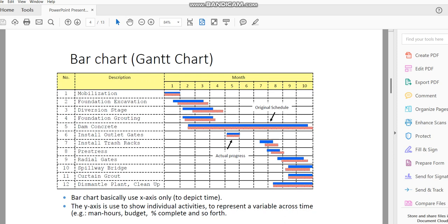And then mobilization of equipment is 20,000, so that's 20%. We hardly want to do that, unless it's a very, very clear cut activity that is based on money. Otherwise, for some activities you have a lot of money coming in at the beginning, so that means your percentage is very high at the beginning, and that is not practical anymore.